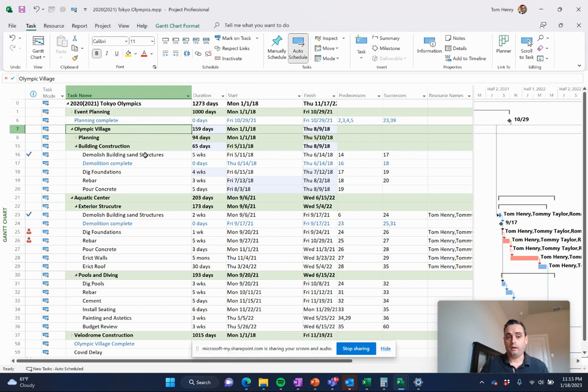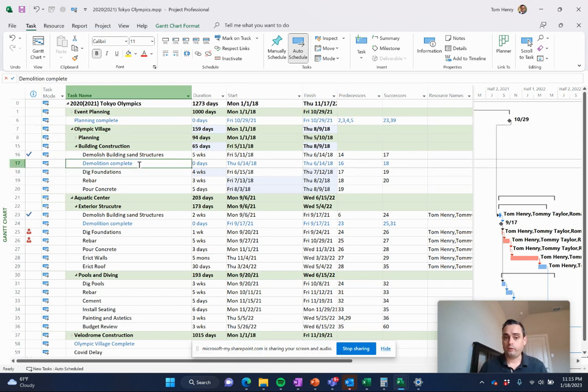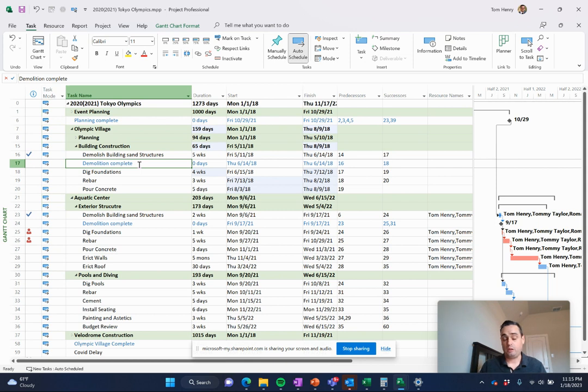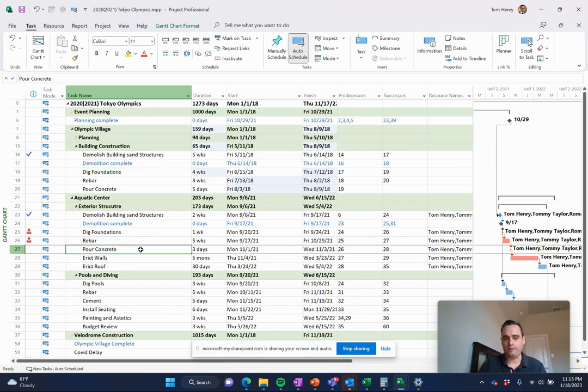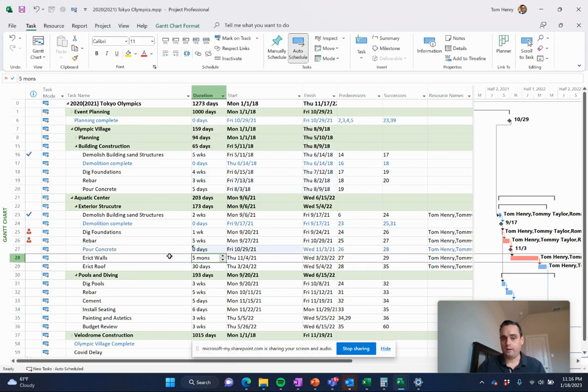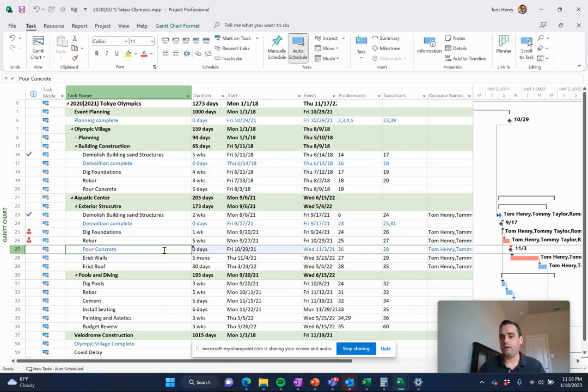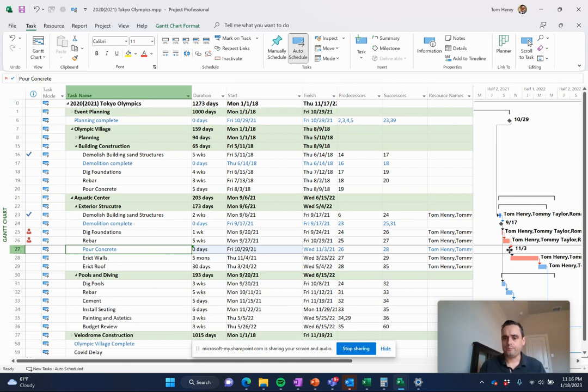I can color code my milestones to make them pop, and I don't have to come in and update those like you would in Excel. So it's dynamically going to do that. So if I make this task here a milestone by saying it's going to be zero days, it instantly becomes a milestone. And you can see on this schedule, it is now represented by a diamond.